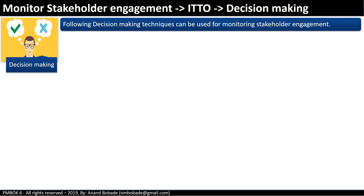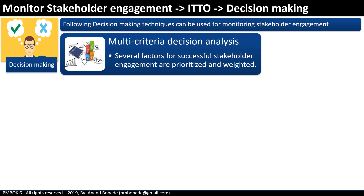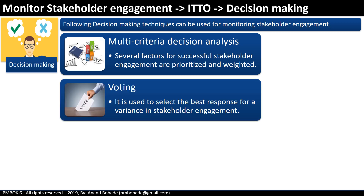Under decision making, once you have multiple options from the alternative analysis, you need to decide which option to choose. Multi-criteria decision analysis is a technique where several factors for successful stakeholder engagement are prioritized and weighted to identify the most appropriate choice. Another decision-making technique is voting, which is used to select the best response for a variance in stakeholder engagement.